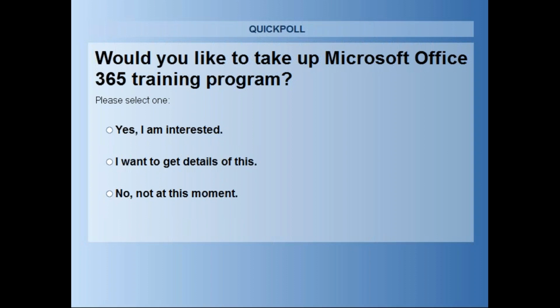You know, they release new things probably 3 or 4 times a year into the product. And sometimes you just see an additional box that pops up on your screen here. So it wouldn't actually break anything that you have now. It would just give you that additional functionality immediately as soon as it popped up. But right now, all it offers is one set start date and one set due date. So any of these tasks would need to be completed within that time frame, or you could break your buckets down, or your specific tasks inside your buckets down a little bit more.